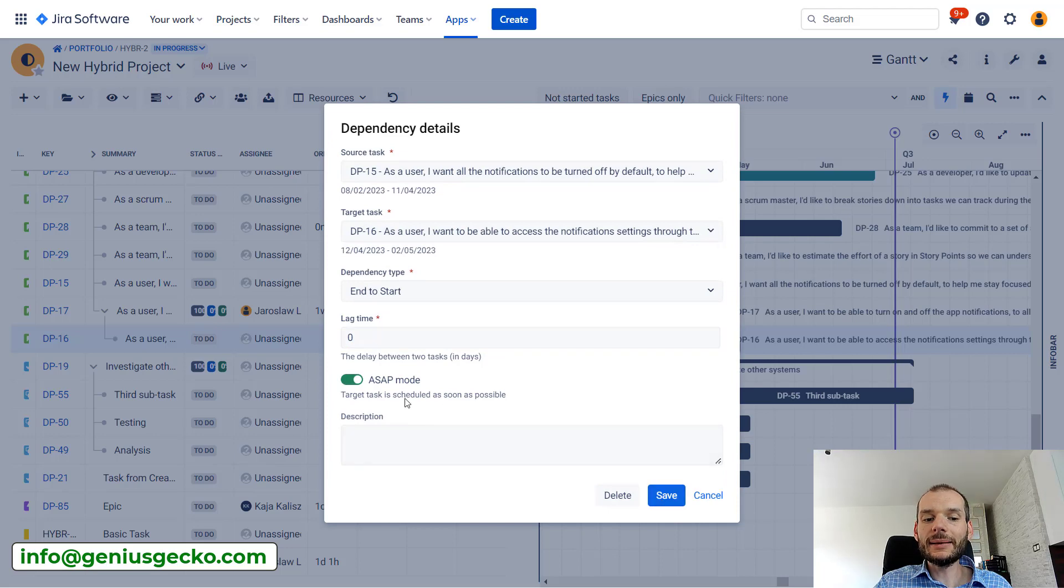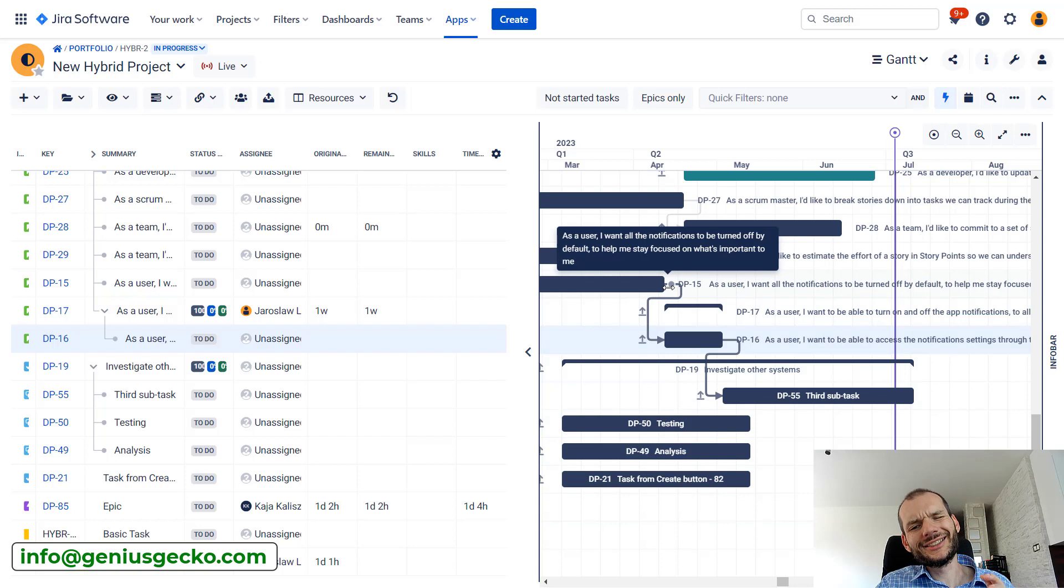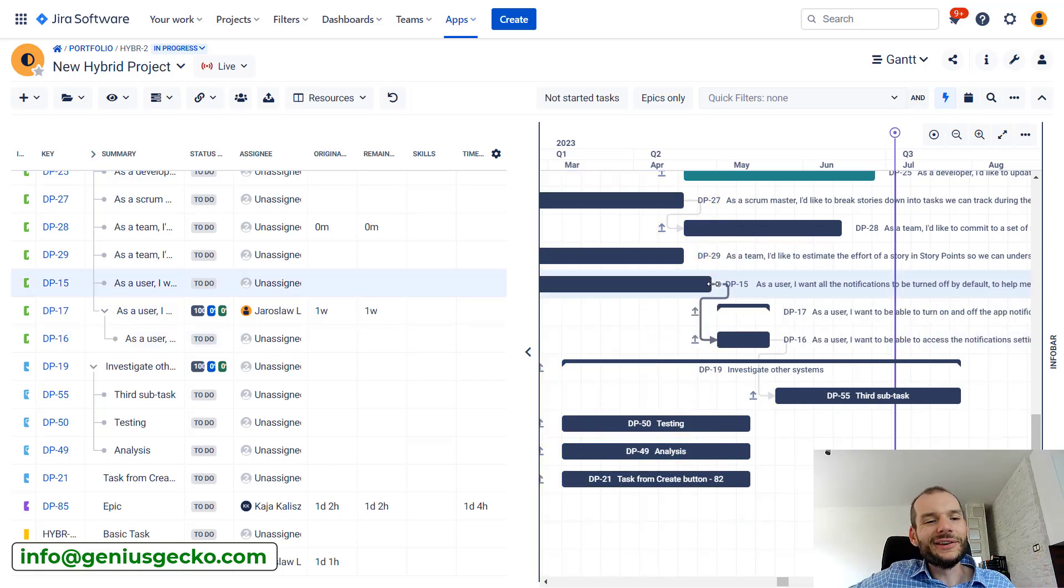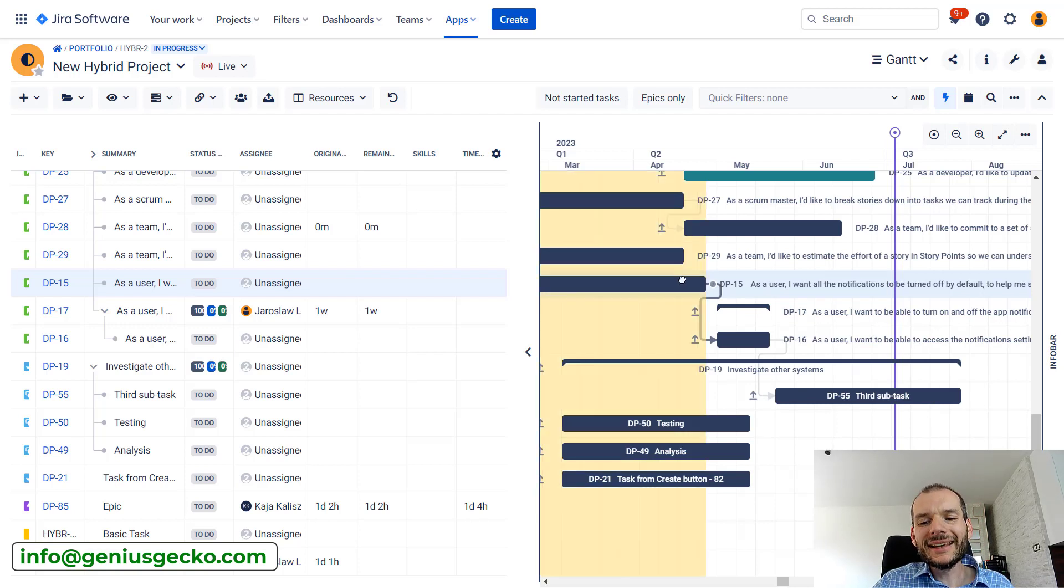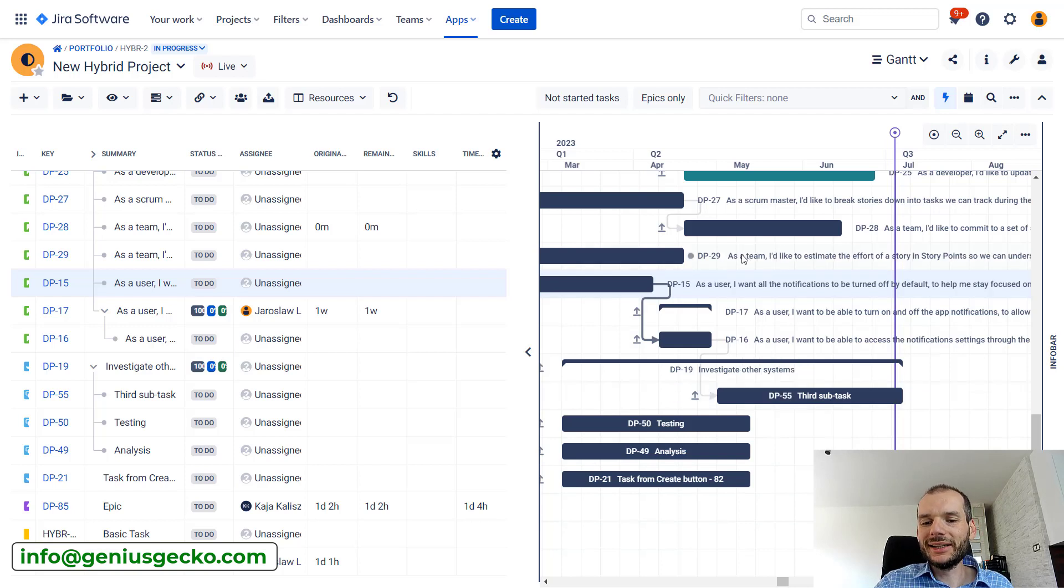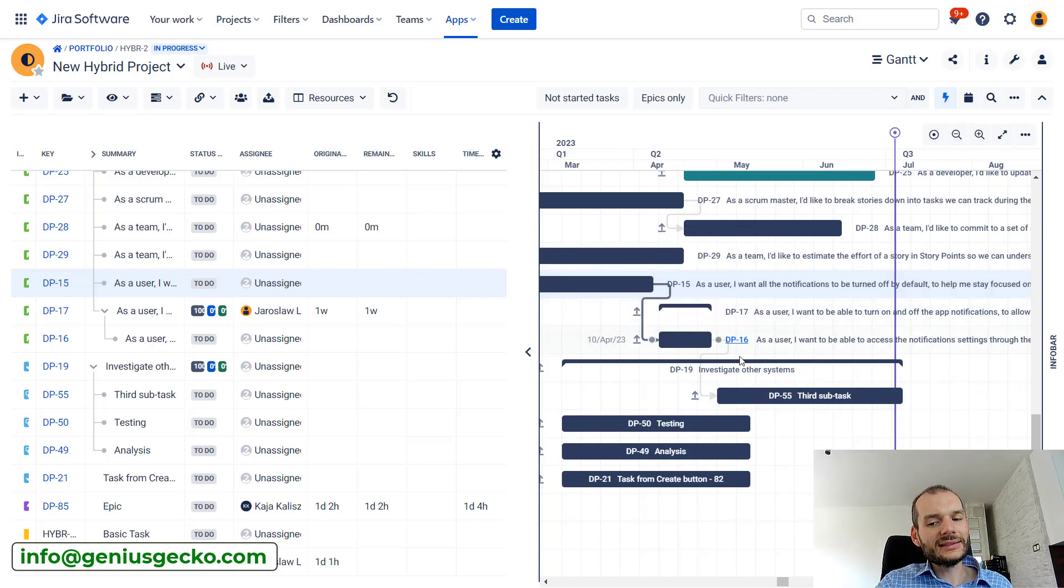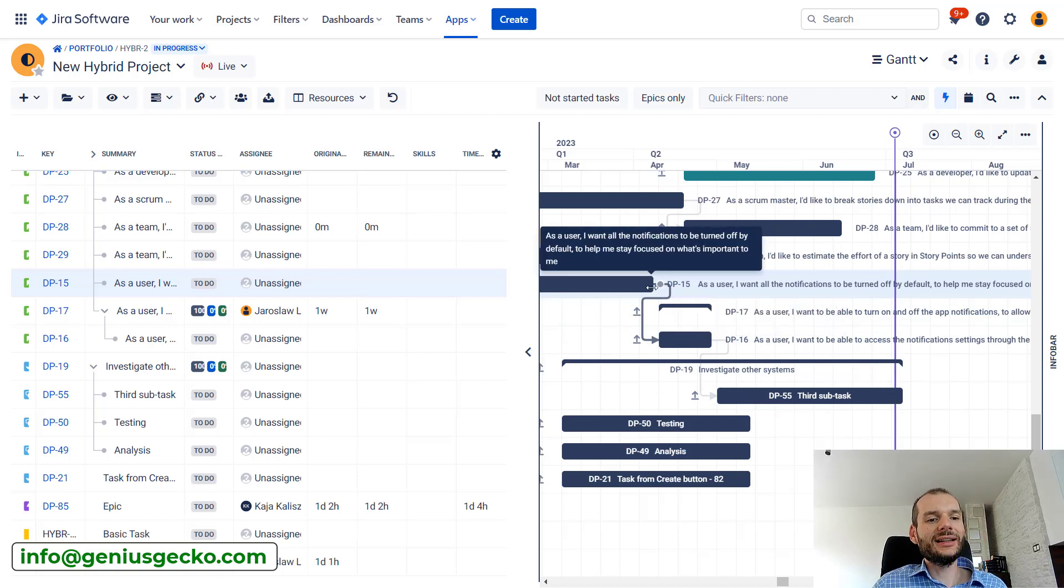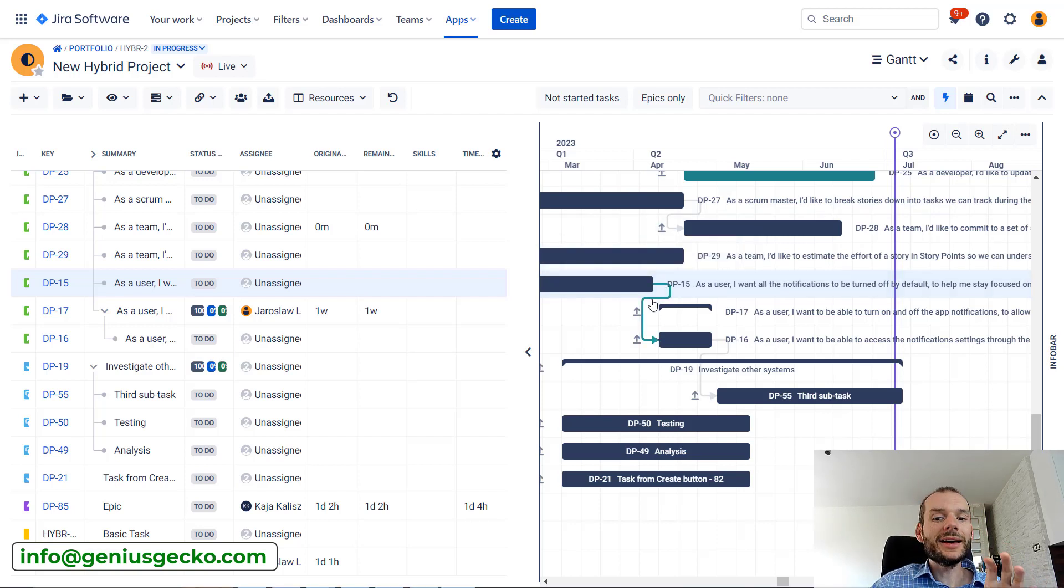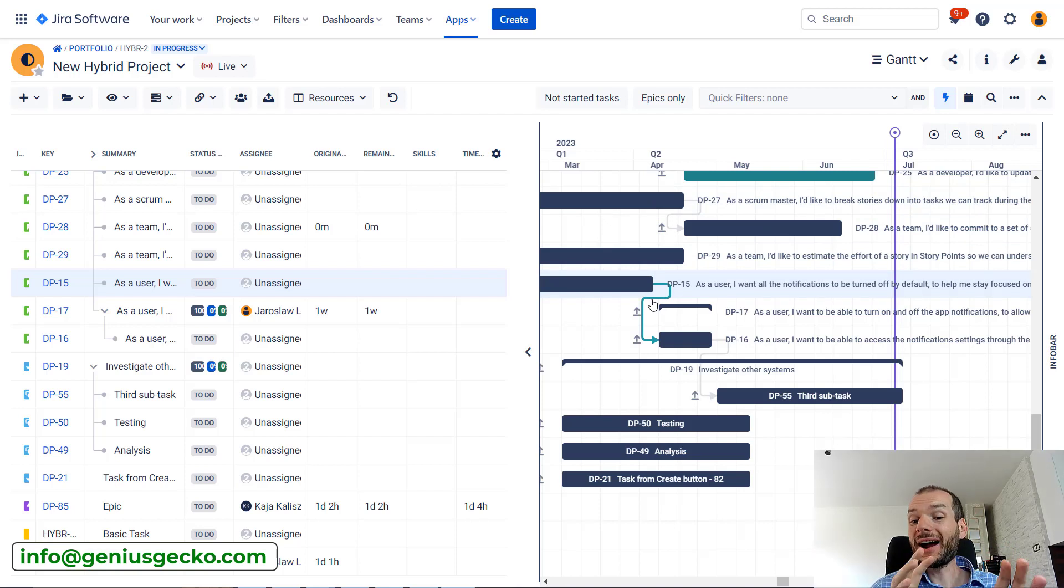One more important thing to mention with ASAP mode is that with ASAP mode on, it's way easier to revert changes. Sometimes people make changes by mistake, so they move the task and 50 other tasks dependent on this one will also be moved. But if we did that by mistake, reverting that without ASAP mode will be challenging - we'll have to potentially move each of these tasks that were updated manually. While with ASAP mode enabled, we can just shorten the task that by mistake we've changed and everything else should adapt properly.